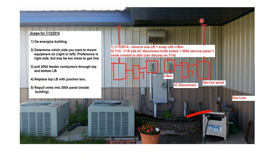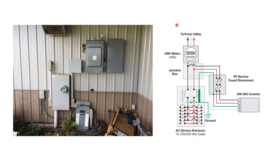We actually used microinverters on this project, even though microinverters have those rooftop issues and are more expensive. What we wanted was to use Half Moon's electrical contractor, who was doing the work on the rest of the building, to do the install as well. Using microinverters allowed us to be on alternating current in the attic. Direct current has to be enclosed in metal, so you could use metal sheathed cable for your direct current circuits, or run metal conduit through the attic. But with AC, you can use Romex. So we just ran Romex through the attic. It was a very quick install, and worked out real well.